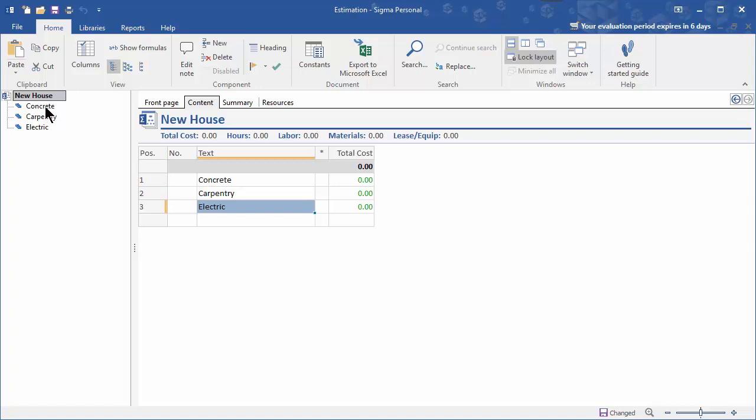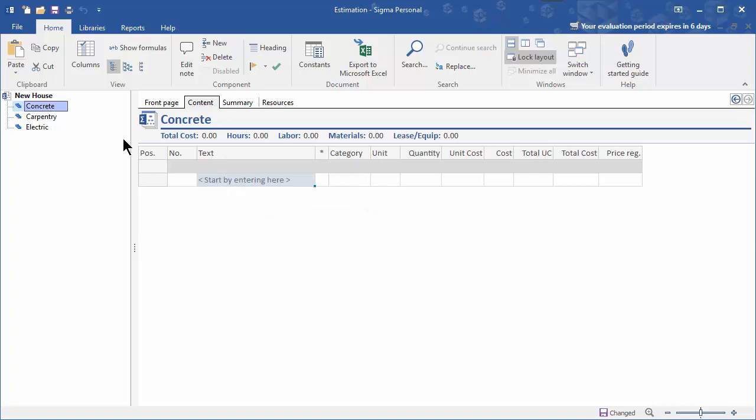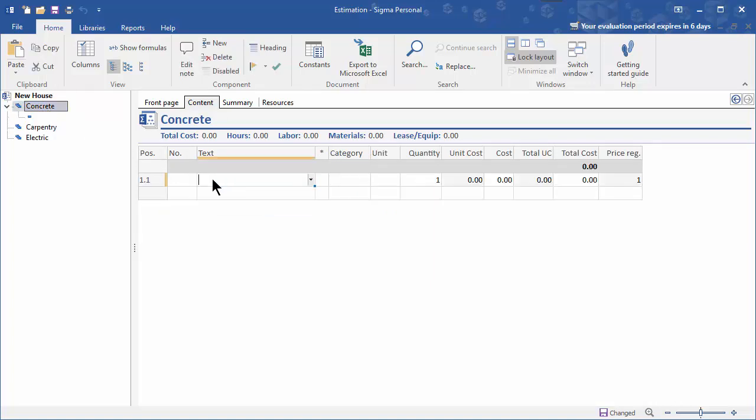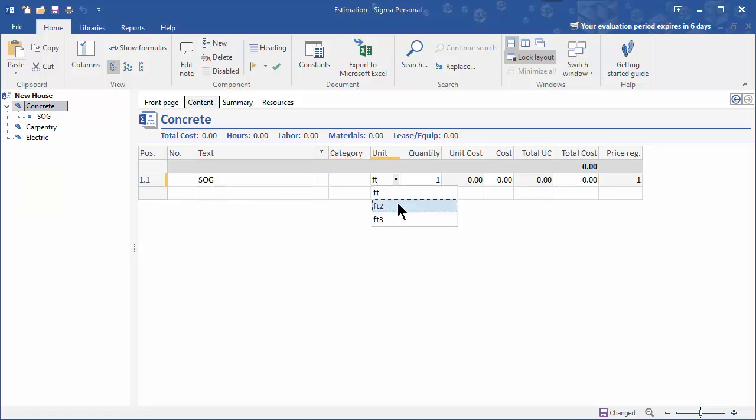Once you have the main headings created, you can create the components that make up your estimate. For instance, let's click on concrete and let's suppose that we have a slab on grade and it's in feet squared. So you start typing and you get a drop-down box with suggestions for the units.